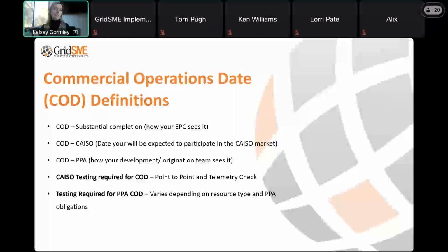We get a lot of questions about what testing is required for CAISO COD. It's really just those two things from CAISO's perspective, but your utility partner, your participating transmission owner, is going to have additional testing requirements that you need to be aware of as well.